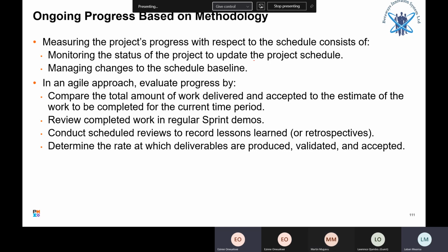You must write it down somewhere. This is very important. What we call a sprint review is very formal. You can invite stakeholders, take minutes, but the retrospective is informal. This is informal because this is for the team to learn. So when the team is doing a retro, they normally learn and laugh about the mistakes. There should be no boss invited in a retrospective because people will not speak honestly when there is a boss around.